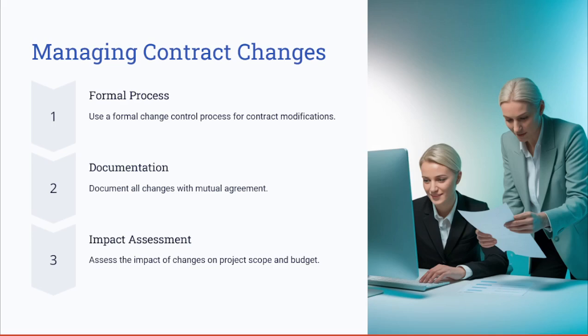For example, let's take an engineering project. If the material costs increased, both parties must agree on the budget adjustment, and documenting these changes prevents disputes and ensures the alignment with the project financial goals.